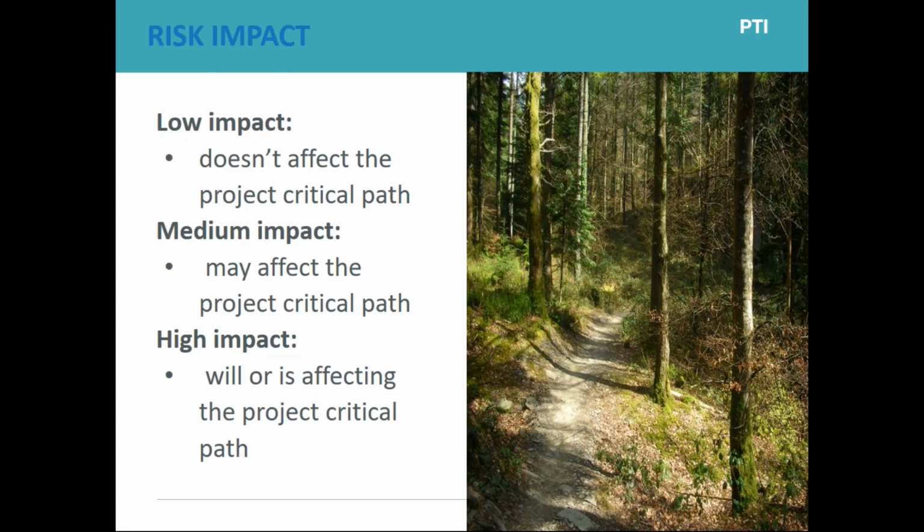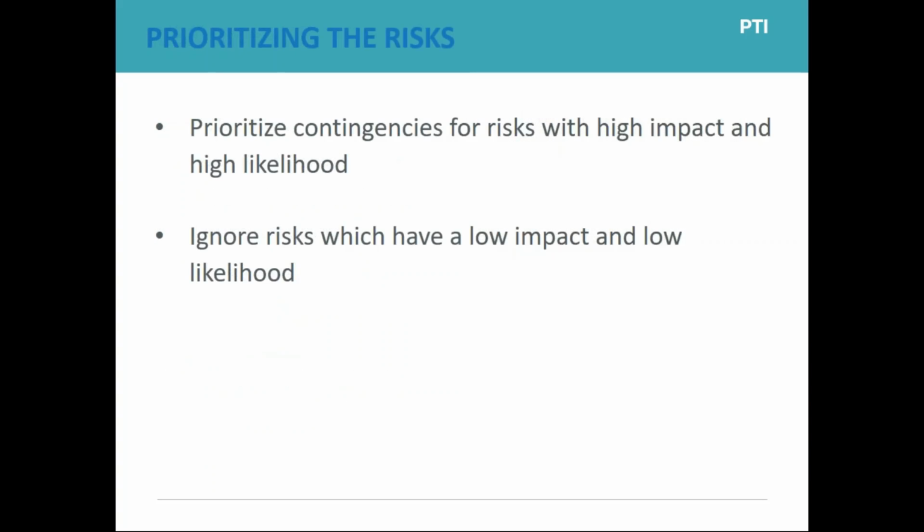In looking at your risks, and as everyone is extremely busy, you really want to ignore risks which have low impact and low likelihood, because that's just a waste of your time whenever you've got other things to think about.